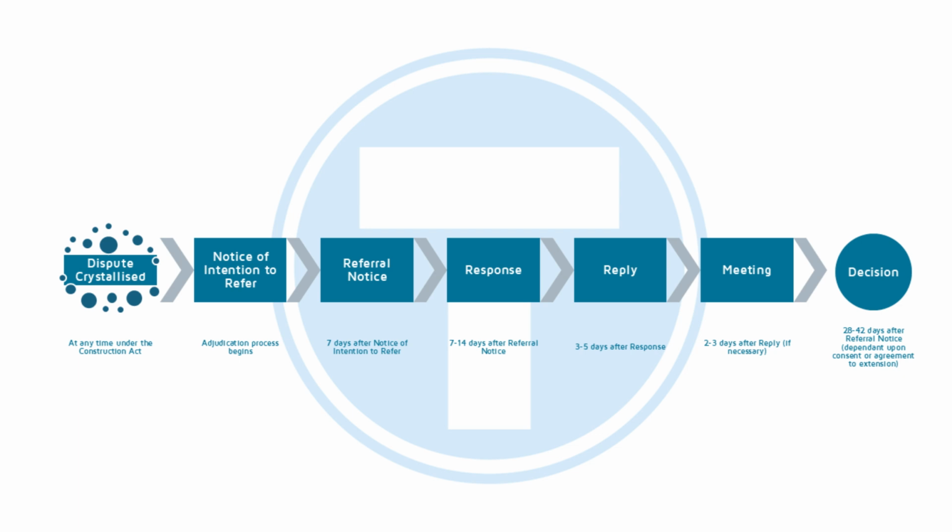The parties to a construction contract are entitled to refer a dispute arising under the contract to adjudication at any time. However, the dispute must first have crystallized. Dispute crystallization occurs when a disagreement or conflict between two parties becomes clearly defined and tangible. The parties have articulated their positions and specified the demands and nature of the issue at stake. If the dispute has not crystallized before the notice of adjudication is served, the adjudicator will lack jurisdiction to determine the dispute and could be challenged on enforcement.